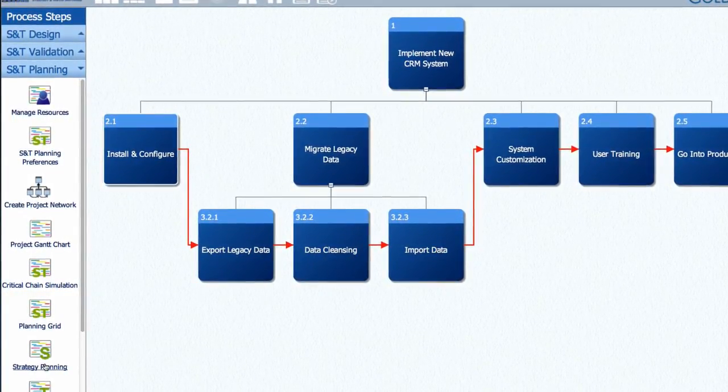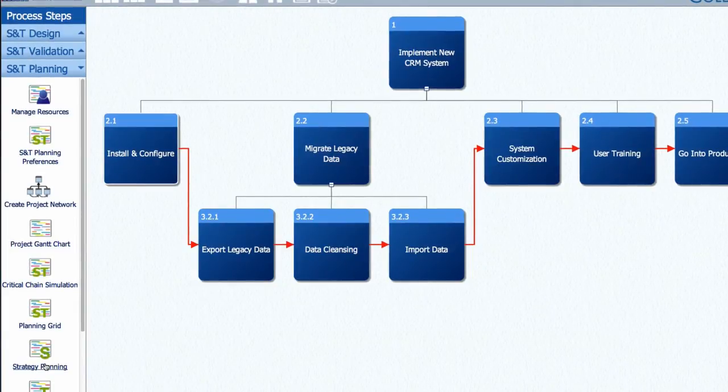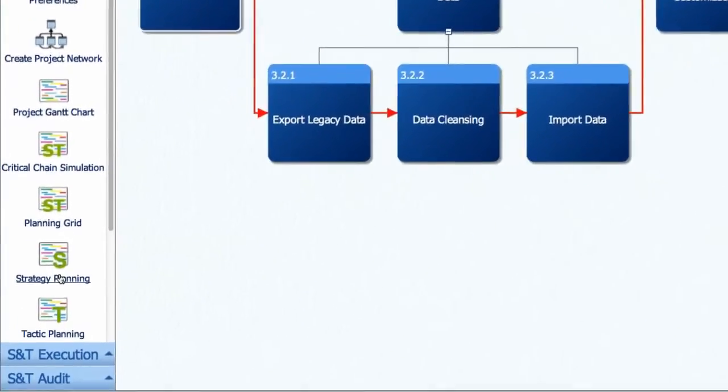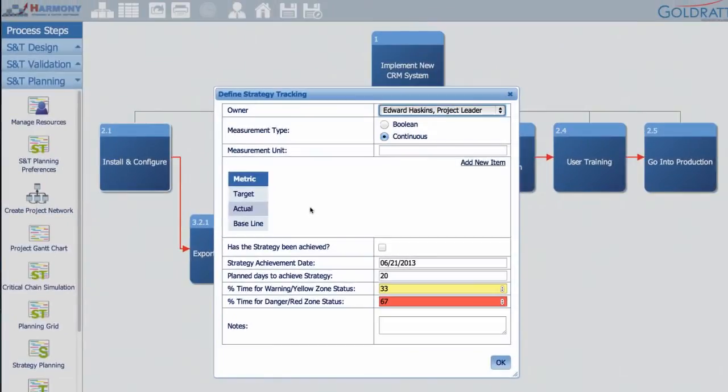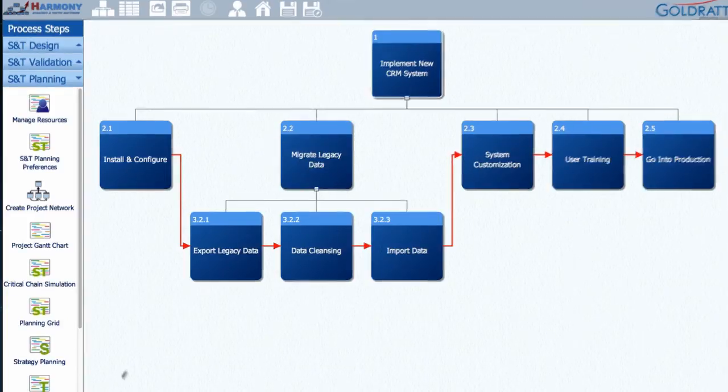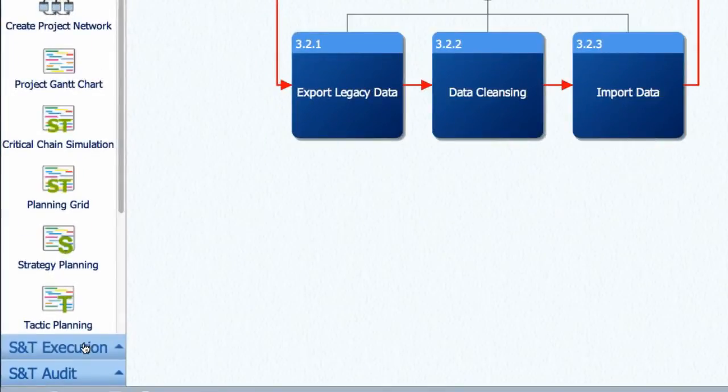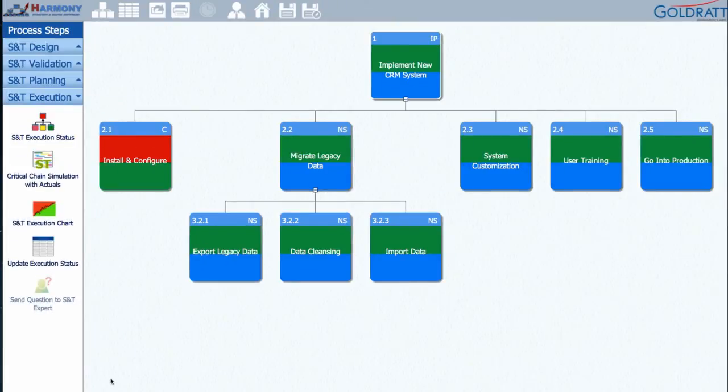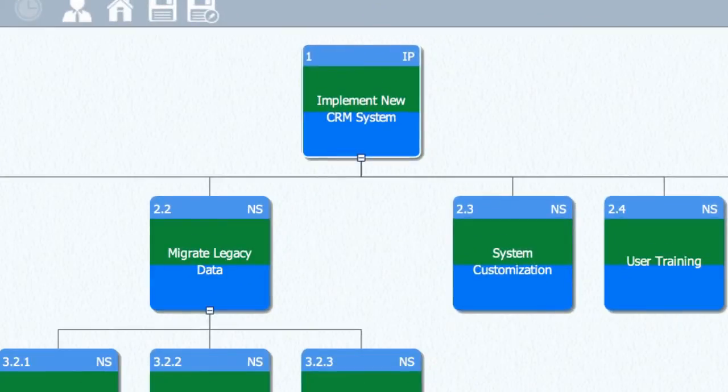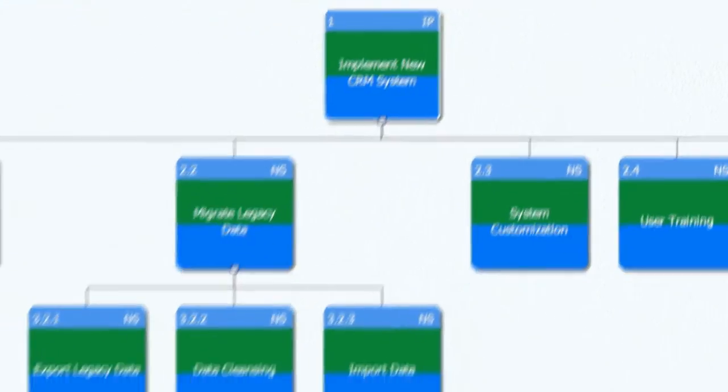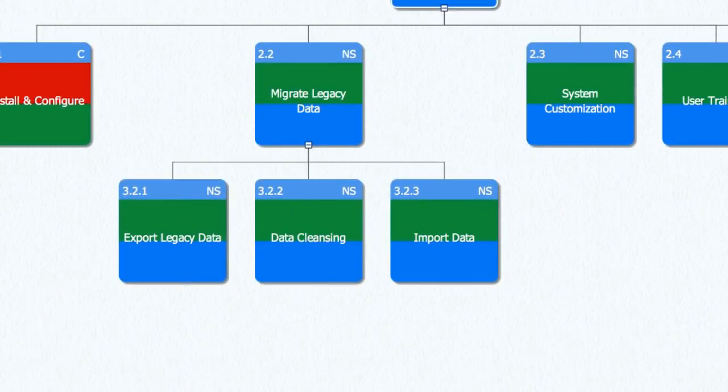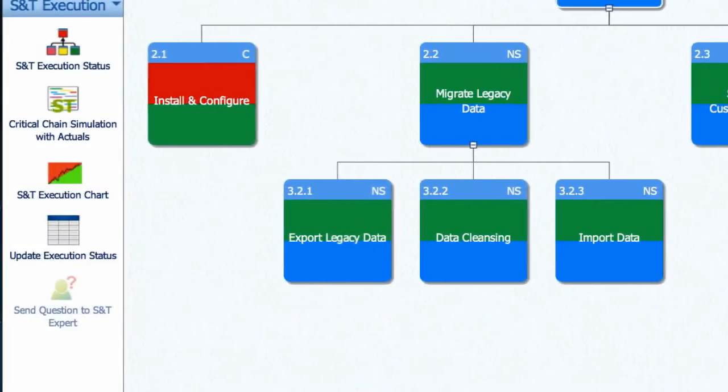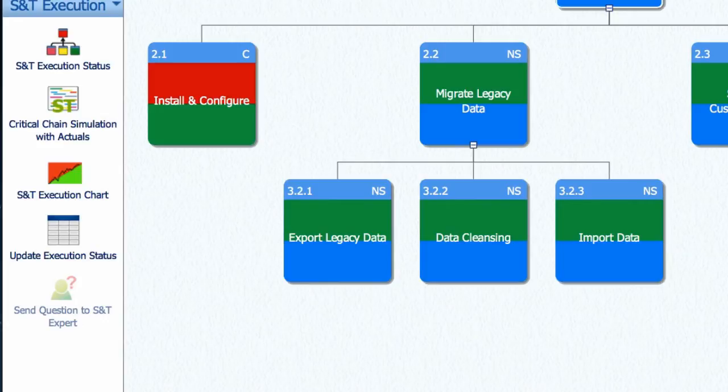Strategy owners can update the status of strategy achievement using the Strategy Planning button, where they can define measurements for each strategy and indicate when it is achieved. Go to the S&T Execution module and you will be presented with a dashboard showing the status of your implementation on the S&T tree. Each node is divided into two. The top part showing the status of the strategy achievement and the bottom part showing the status of the tactic implementation of that change. If a tactic implementation or strategy achievement is delayed, it will become red, showing everyone exactly where their attention is most needed.